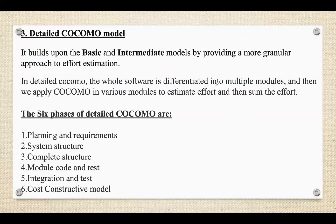The third type is the Detailed COCOMO model, an extended version of the Intermediate COCOMO model. It offers a more refined approach to estimating effort, time, and cost by incorporating additional phases of development and more detailed cost drivers. Detailed COCOMO allows for greater precision by evaluating each phase of the software development process separately and applying different effort multipliers to each phase. The six phases of Detailed COCOMO are: planning and requirements, system structure, complete structure, module code and test, integration and test, and cost constructive model.